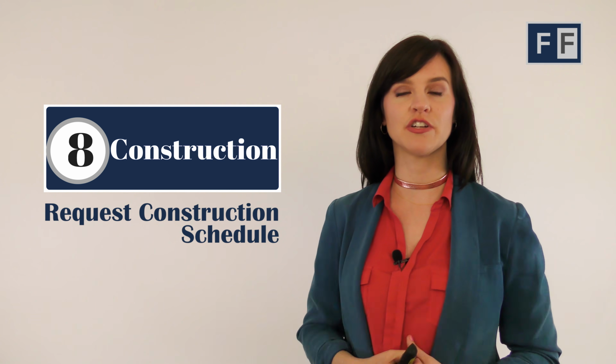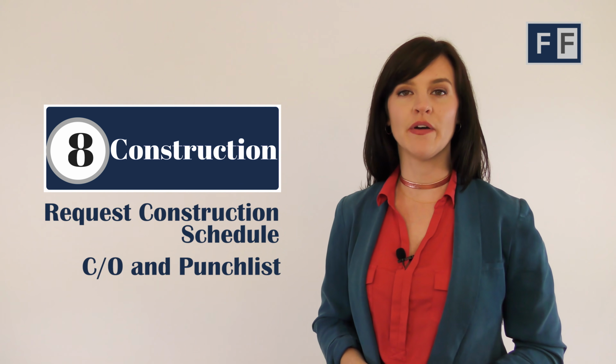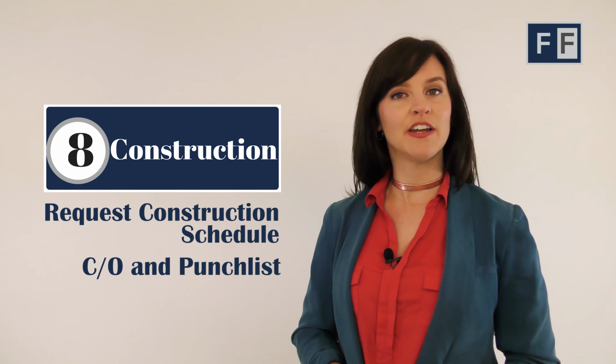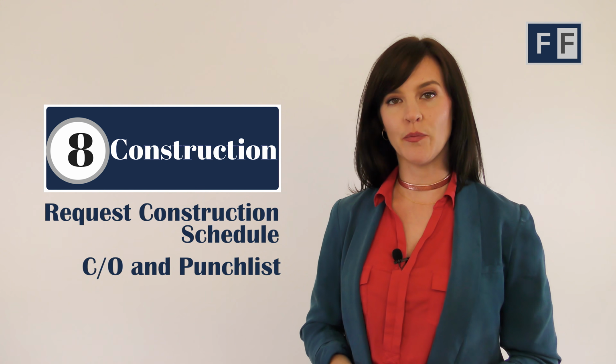Now, at the end of construction, you're going to be issued a CO or a TCO. Now, a CO is a certificate of occupancy, which means that the building department or the municipality in charge has said you're good to go. You fulfilled all the requirements of the permit and you're ready for opening day.